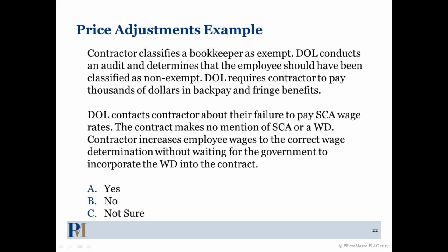So remember, DOL can come and investigate you, but ultimately if there's a problem like there is in this example where there was no SCA in there to begin with, then the DOL has to go to the agency first and get that fixed before they come after you. And once the agency does it, if you've done it in advance, remember the Delta rule, right? So if you've increased wages in advance, then you have a problem.